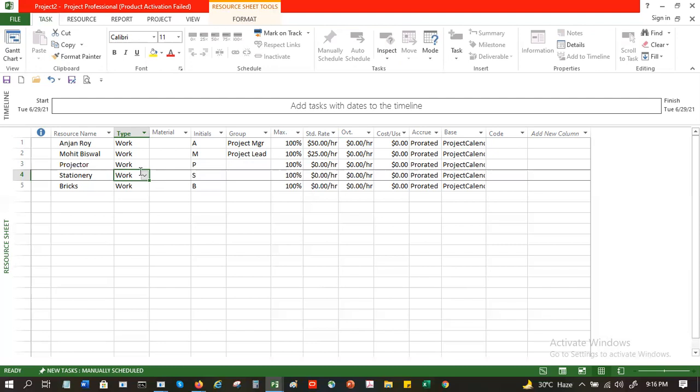Correct. But here also, in Primavera you can build a resource master, just like a resource sheet. There you can define the resource master. Typically this is a one-time setup, because you don't define resources regularly, unless they retire, they leave, or new people come in.